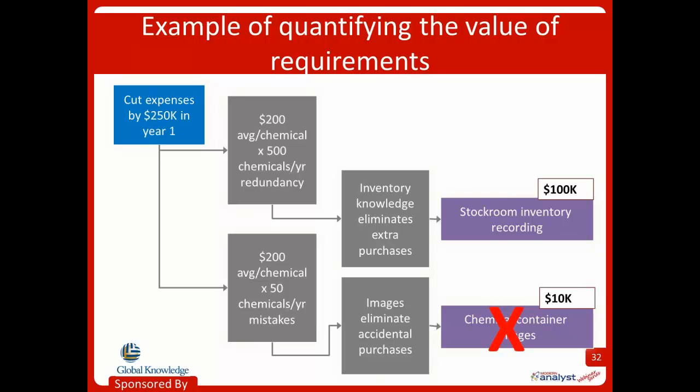Now the stockroom recording feature, let's analyze that one. We're going to take it from right over here up to the left. The stockroom recording requirement helps contribute to our business objective because if the lab assistant knows what's in the stockroom, they can avoid buying chemicals that are already in stock. Maybe our data, and we have to have this data in this case, says that not buying chemicals that are already in stock saves on average $200 per chemical. And we know that last year we bought about 500 chemicals that we didn't really need; they were actually in stock. So we do the math of 200 times 500, and we end up with our benefit over here on the right. I am absolutely doing simple math to get there.